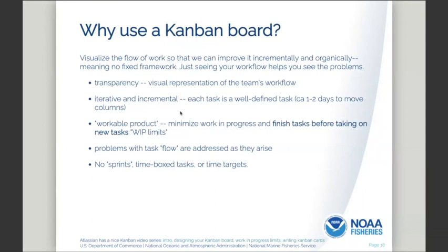And it's also encouraging you to be incremental. You do tasks, you focus on the task, get that done. This is really different than Scrum in that there's no sprints, there's no time-boxed task. You just have the tasks come in and then you grab one, focus on that task, get it done, and move it across the board. So it's just kind of moving things across the board.